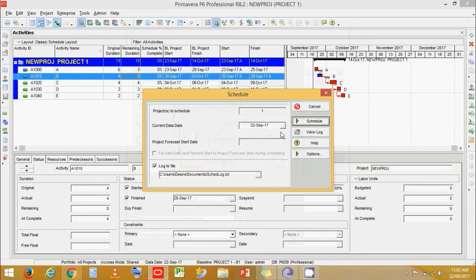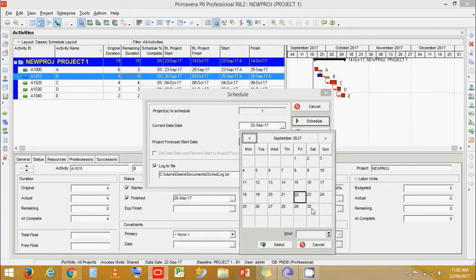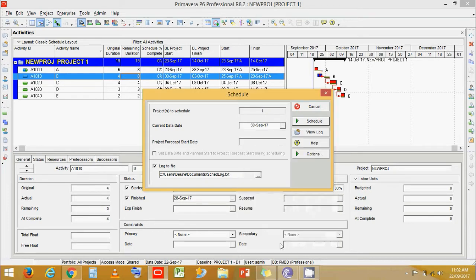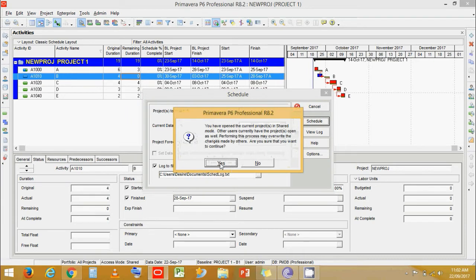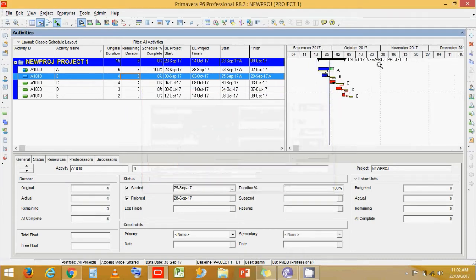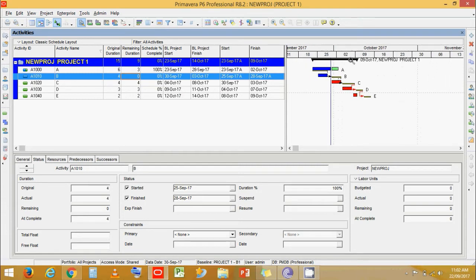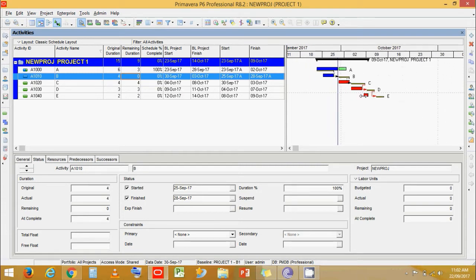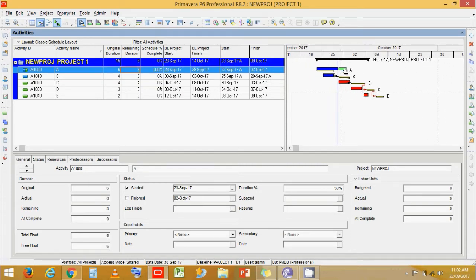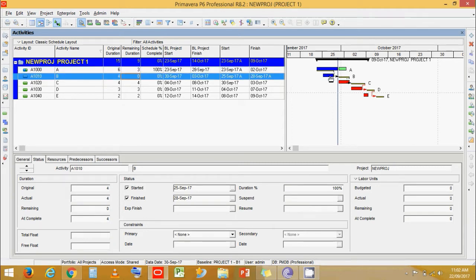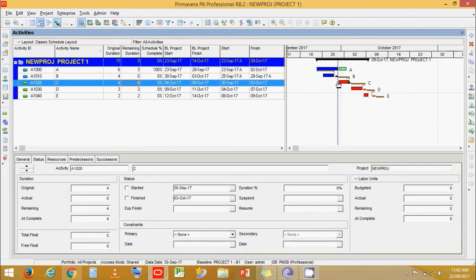Let's schedule it. First, I'm going to change the data date to 30th September. Now if you look closely, we can see that activity A is in progress, activity B is completed, and activity C is now riding on the data date — its start moved from 4th October to 30th September.